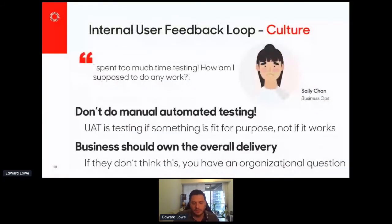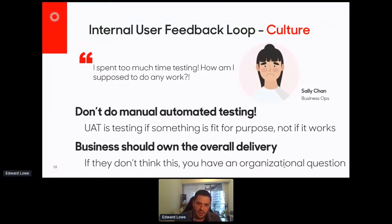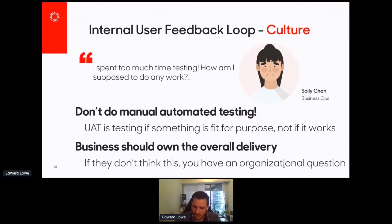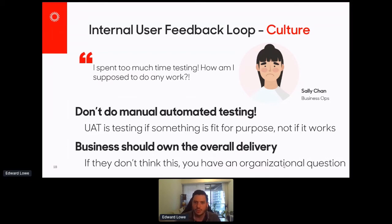Particularly for internal users — if you hear something like 'I spend too much time testing, how am I supposed to do any work?' — there's a cultural break here. The business really needs to own their own delivery; that's an organizational question, not a technical one. And secondly, don't make business users do manual automated testing — don't push out a product that hasn't been automatically tested and then expect business users to do that testing for you. UAT should never be about seeing if something works; it should be about whether something is fit for purpose. That's a very important distinction.